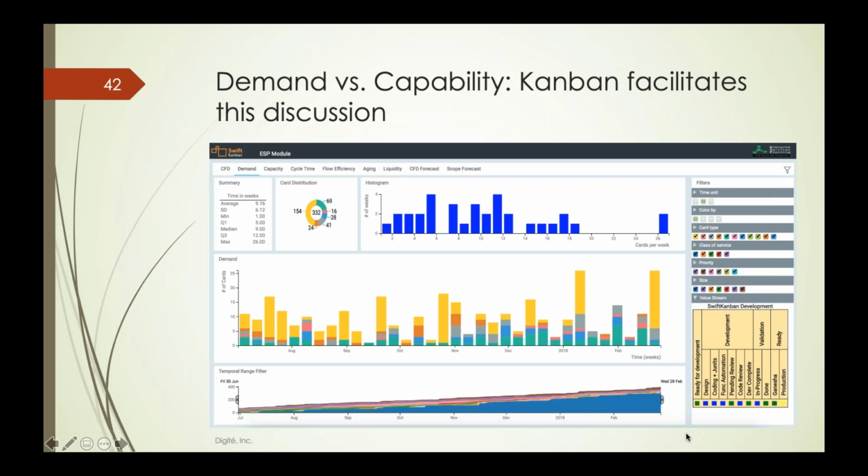The ability to accurately measure the value stream or the cycle time depends on the way that you define the boards. So typically, if you have a hierarchy of themes, epics, and user stories, let's take a simple example, then you could be looking at the cycle time or lead time performance at the user story level, which perhaps has its own Kanban board, or you could be doing it at the epic level, or at the theme level.